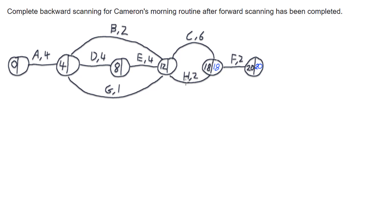It gets a bit different when we have multiple paths. When multiple paths come into a single node, I write my solution on the arc and then work out which value to put in the node. Looking at H: H takes 2 minutes, so 18 take 2 gives me 16. Looking at C: 18 take 6 gives me 12. I pick the smallest of these two, because the smallest represents the latest I can start for both paths. Picking the smallest value means that when I finish, I'm going to finish still on time, because it's the longest activity that creates this constraint.